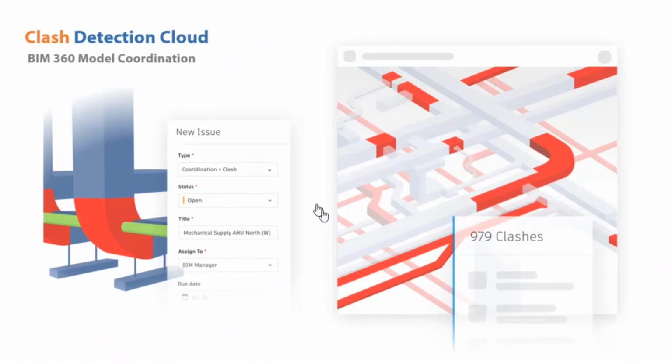So basically, we are recommending BIM 360 Model Coordination, which is a cloud-based model coordination package that provides a coordination space to upload, review, and detect clashes between the latest set of project models. It is integrated with the BIM 360 environment. It leverages the permission system of BIM 360 Document Management with automatic clash detection within the designated coordination spaces.